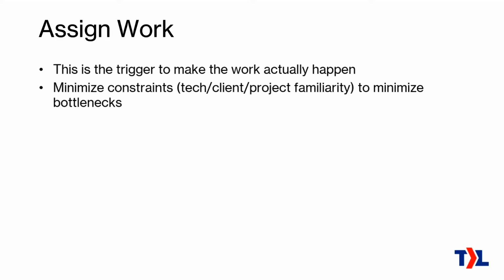You have a bit of a problem if you have certain clients or certain technologies or whatever, and you know that you can only assign that to your one senior engineer. That's a bit of a concern. That's going to lead to the senior engineer becoming your bottleneck. It's quite common in MSPs. So yeah, you want to try to avoid that, sometimes by training, by writing good SOPs, standard operating procedures, so that junior engineers can do more, because the instructions are all laid out.